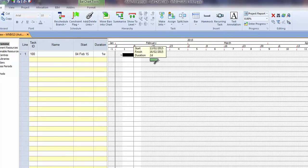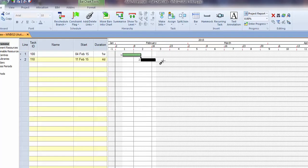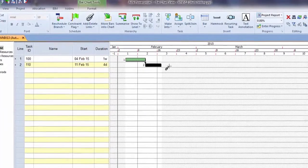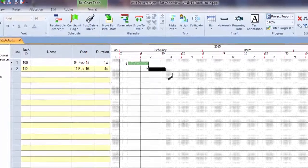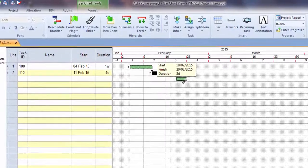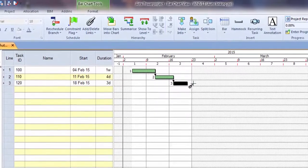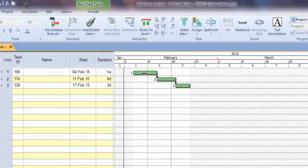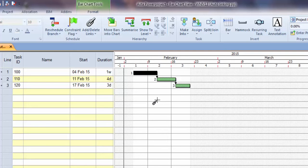And then if we create another task with the first one selected, it creates a link between those two. I've got auto schedule on, so it's going to move the task around as we create that.